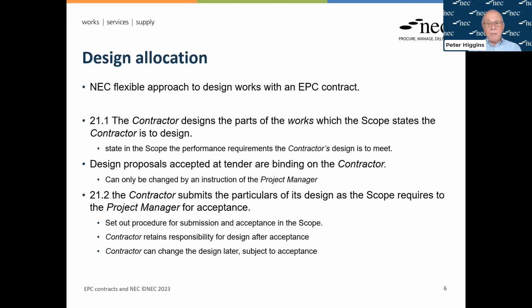Now, it may be that for an EPC contract, you've got some very clear ideas as to which bits of design are really crucially important to how the thing works, and others are a matter of detail that can be left to the contractor. So you could specify which parts of design you want, what level of information you want, how you want that submitted, when it's to be submitted, and what the process is for accepting that design, how that's going to be handled. So the whole of this needs to be set out in the scope. And this gives you, again, a flexibility point. You can specify exactly what you need for this particular contract.